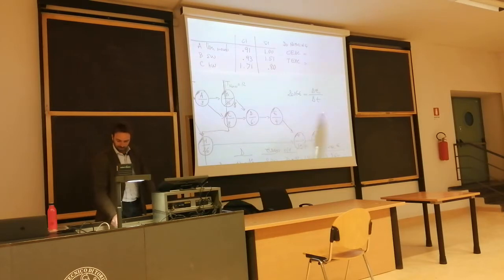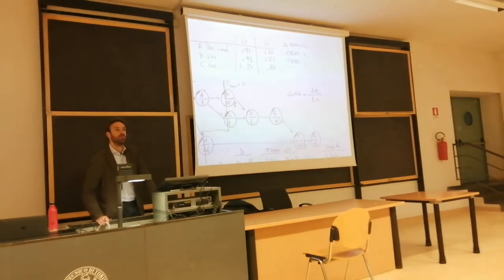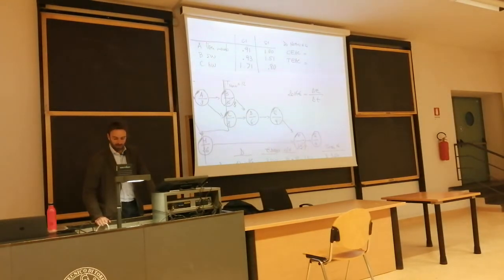Activity A was on time, so 8 weeks long. Plus, how long is this task? 8 divided by 0.8, because the C is going to be longer, right? Plus D, plus E, plus F, plus G. And that's the duration.